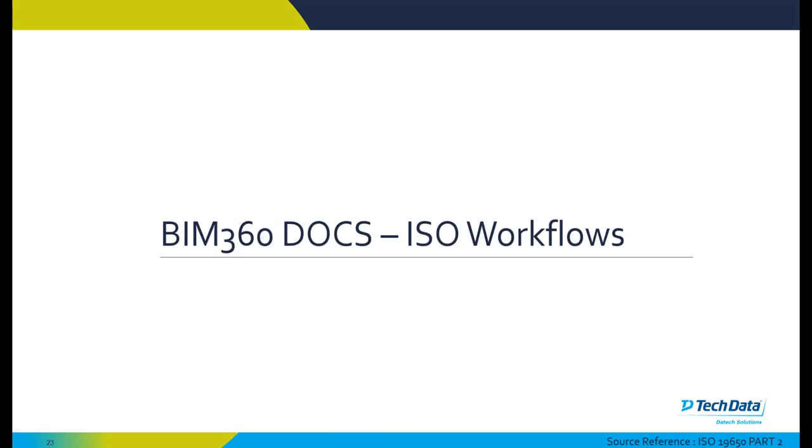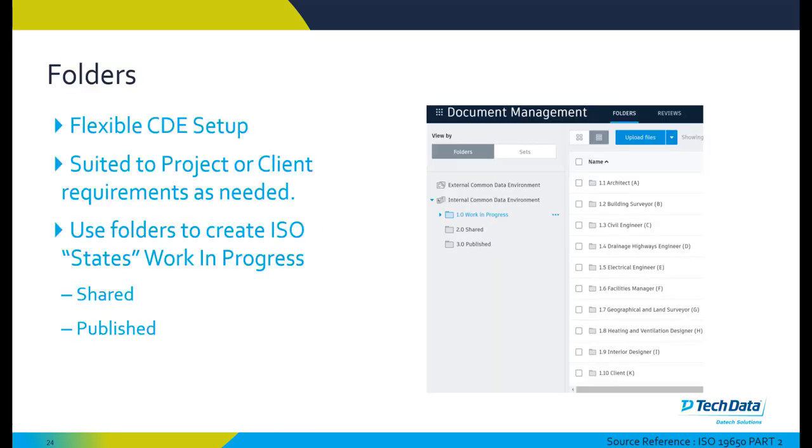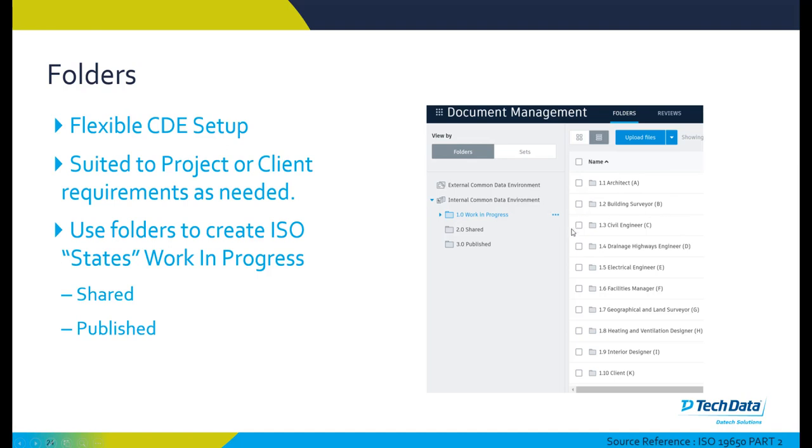To take these particular sections and apply them to a BIM 360 context, we're going to look at some ISO workflows. BIM 360 allows you to create a custom folder structure in response to the requirement of different states of a file or folder within the ISO requirements. Within this, we have a shared folder and a published folder. On the right hand side here, we can see an example of an ISO compliant folder structure. We have a work in progress folder, a shared folder, and a published folder. Each folder has a folder per discipline. This allows us to control that access per team. This can apply within the work in progress, within the shared, or within published. While this is not a hard and fast rule for every ISO compliant project, this is just one example or method to comply with ISO 9650.